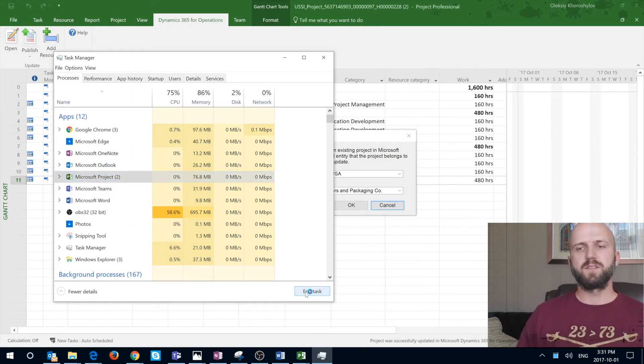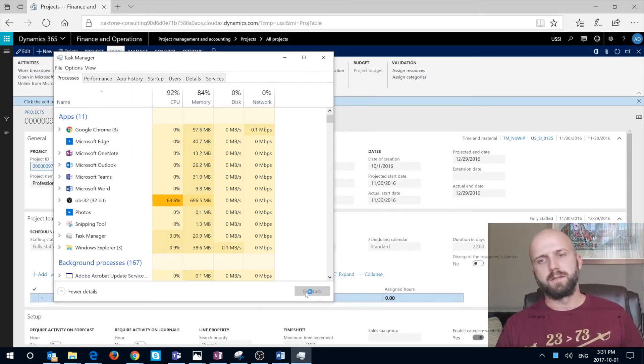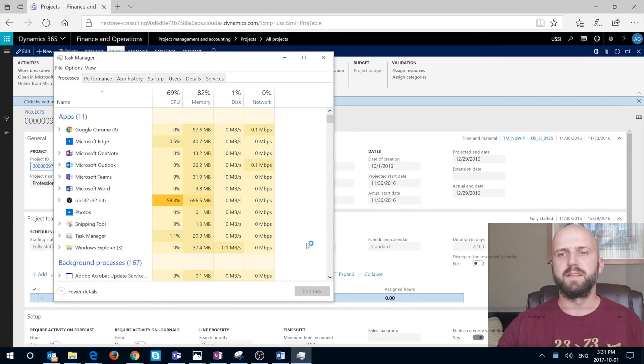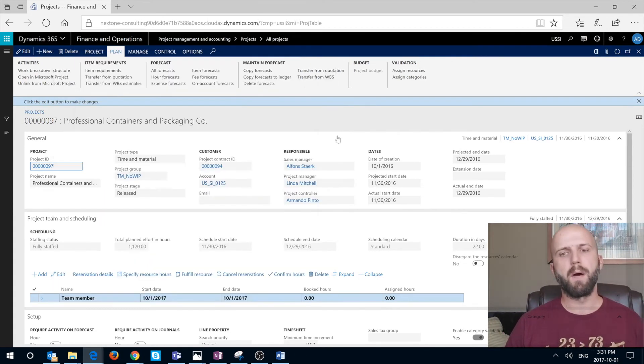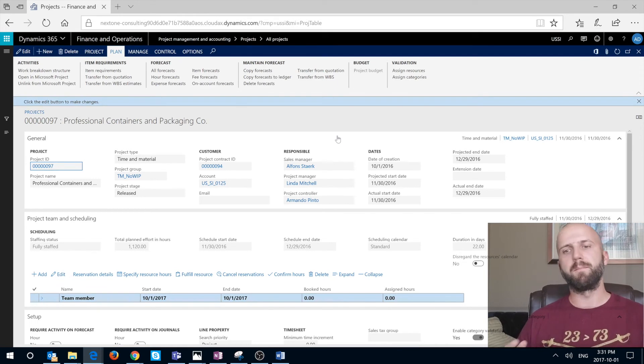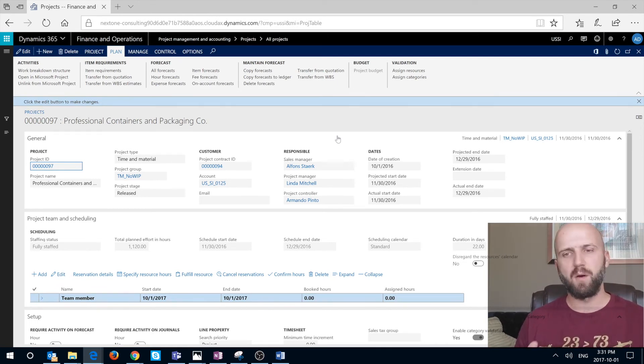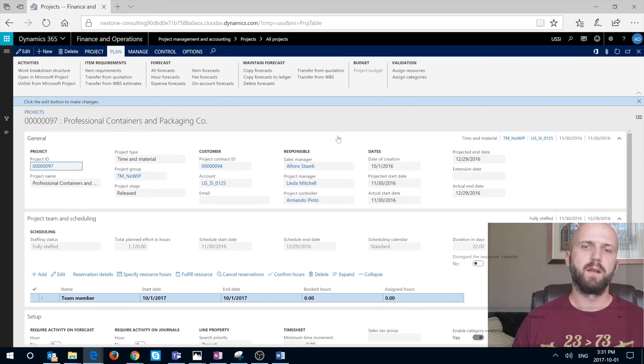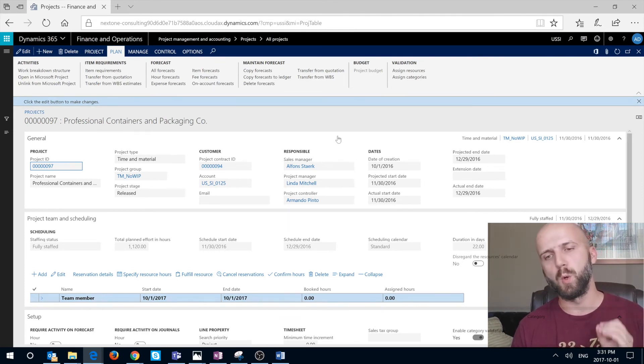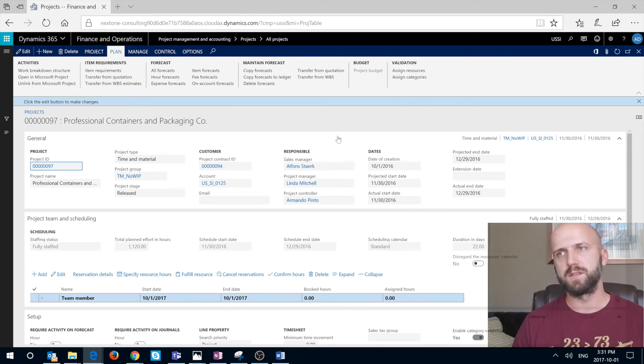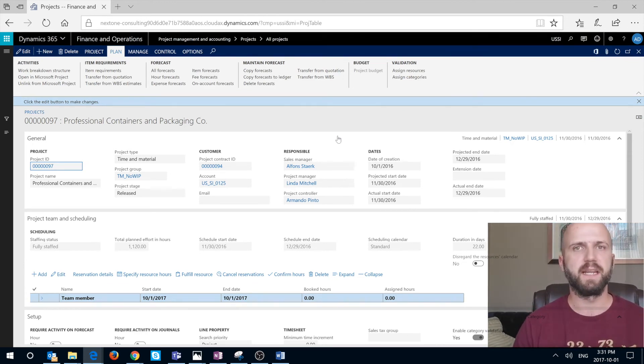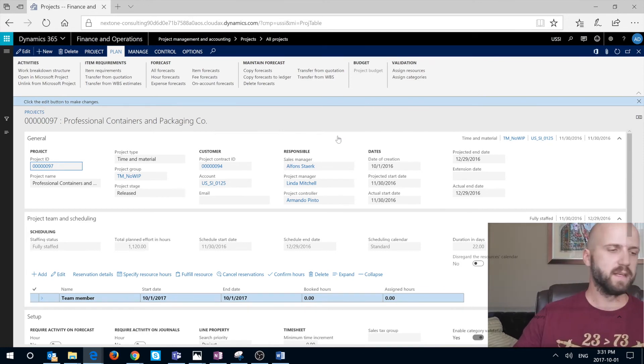So here's another bug on top of a lot of things. You can't really publish to Dynamics 365 using the publish button. You're better off right now in the current release, which is Update 10, and this video is recording happening on October 1st of 2017, to go and save the file and then close that file, getting that prompt and then saying yes.